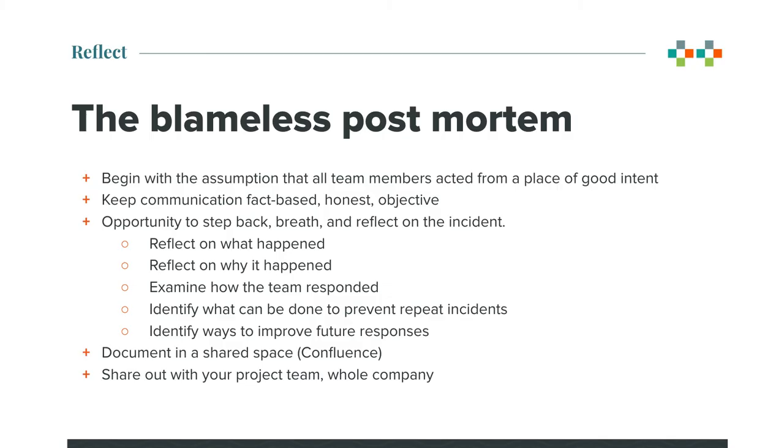A blameless post-mortem provides the team with an opportunity to stop, to breathe, and reflect on the incident. It's an opportunity to identify what went well, what worked well. You'll talk about things that didn't go as smoothly, and then things that the team wants to improve. It's likely that you'll need a full hour for this session, and you'll definitely want to have someone take notes. Sometimes, depending on the magnitude of the incident, you may need 2 hours.